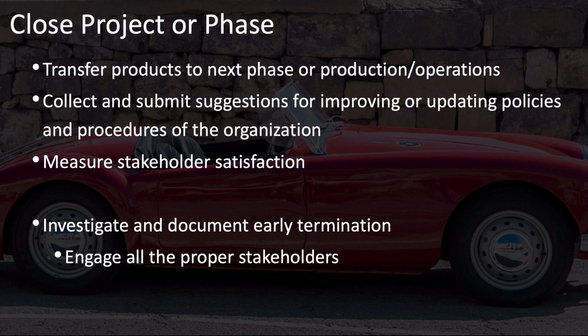If your project has ended early, then you should take the time to investigate and document why it ended early. And as you do this, make sure that you invite and include all of the appropriate stakeholders to make sure you thoroughly understand why this project had to be ended early, what the root cause was, and what you could learn from this in future projects to avoid a similar situation.